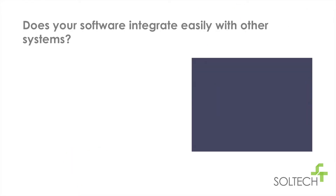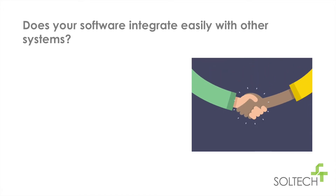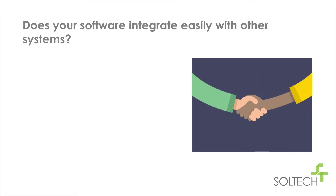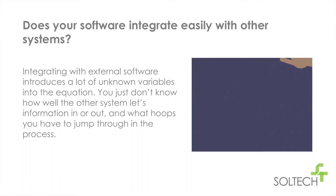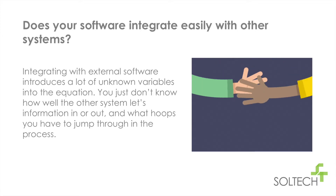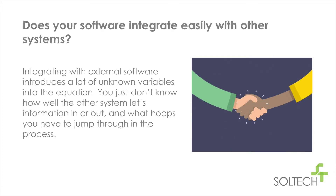Does your software integrate easily with other systems? Integration with external software introduces a lot of unknown variables into the equation. You just don't know how well the other system lets information in or out, and what hoops you have to jump through in the process.